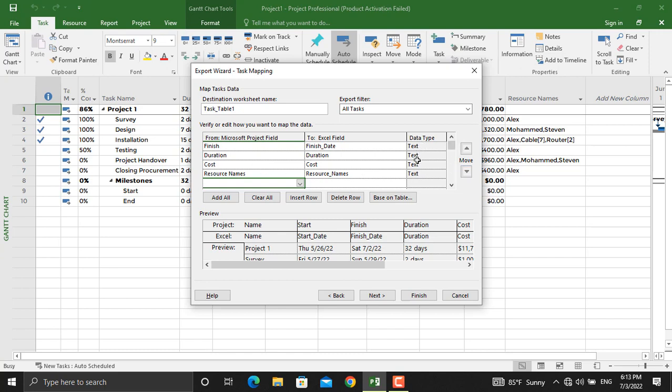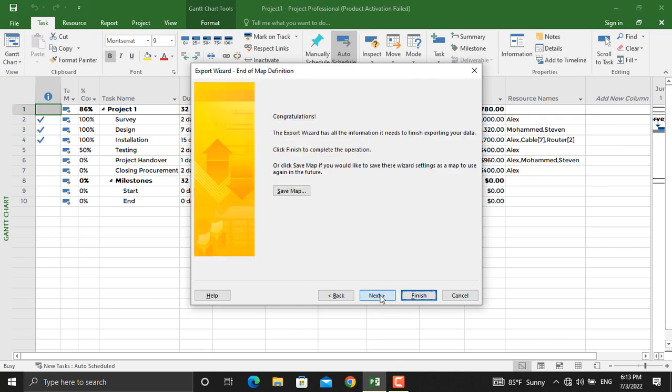The information, whether it's the date or a cost, will be exported as text. We need to change the text to its relevant type. For example, if it's a date it should be previewed as a date, or if it's the cost it should be previewed in terms of cost. I will do that in Microsoft Excel, so keep watching.